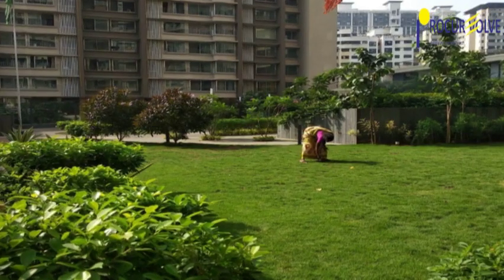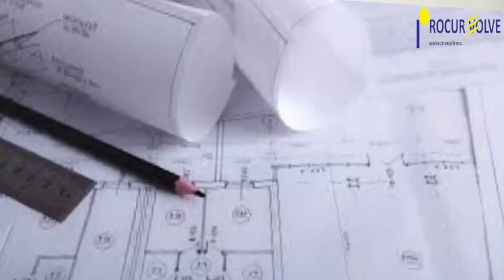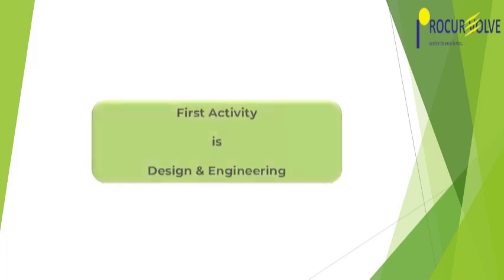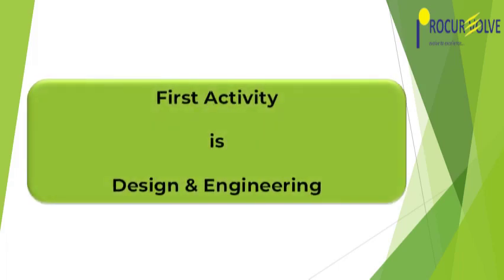Many parameters need technical clarity, and this technical clarity needs to be documented properly. Technical specifications, guaranteed parameters, data sheets, many technical deliverables need to be generated. This portion, where technical design and engineering of the components is carried out, is called the engineering phase of the project. Now these engineering deliverables will be handed over to the procurement team.